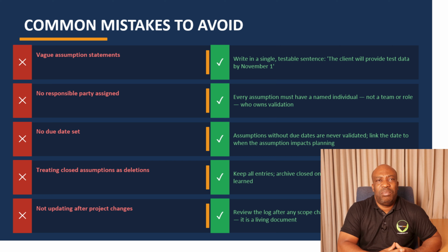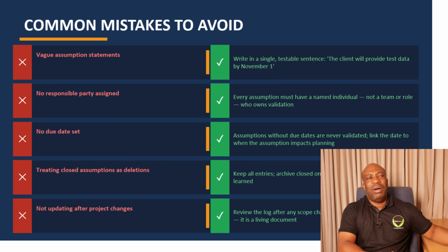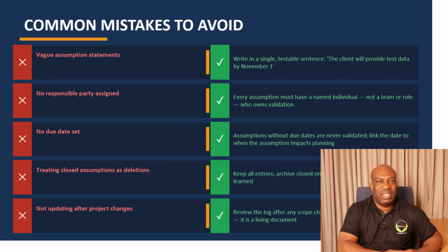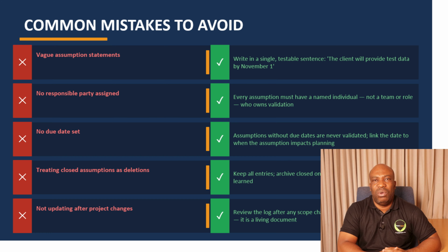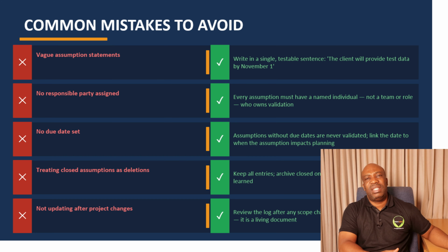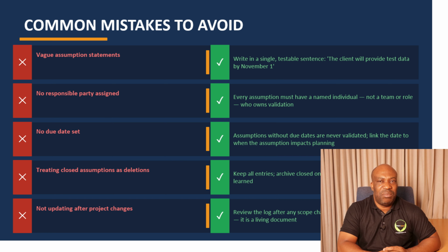The due date is also very important to track progress. Are you on track? Are you not on track? How is it going to impact the other project activities? How is it going to impact the project objectives and also project goals? Say, for example, your due date is way after testing. How is it going to affect things? Is the assumption still valid? So it's quite important that you also capture the due date when you're capturing the assumption.